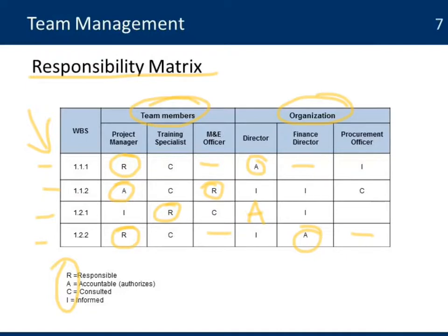That responsibility matrix is also good for everybody to understand not only the responsibility for certain activities, but also the people who are going to be engaging in terms of consulting or informing about the progress of that activity.